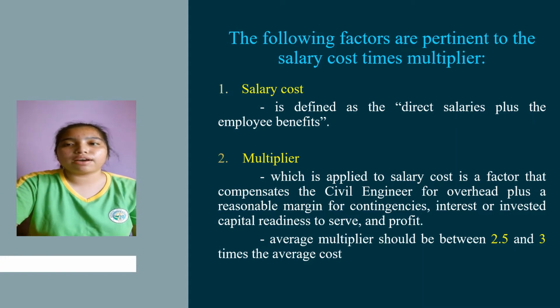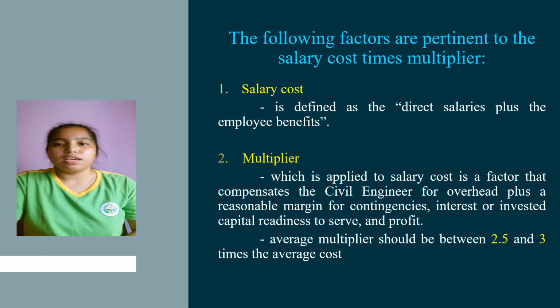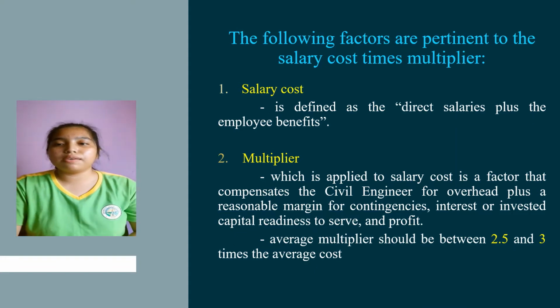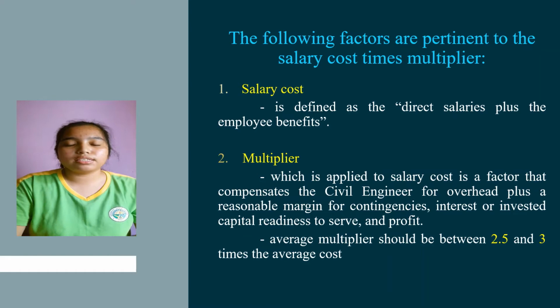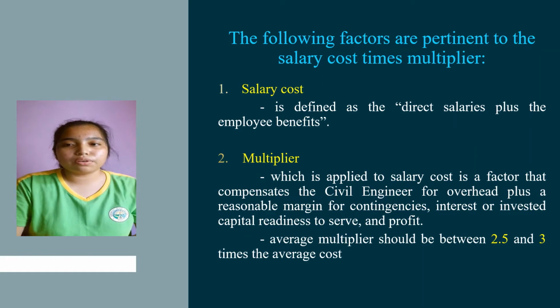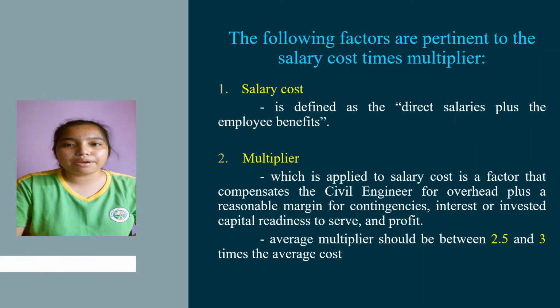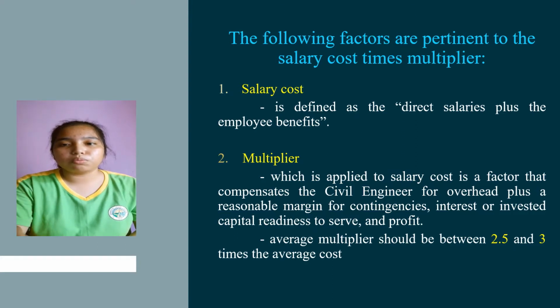Salary cost is defined as the direct salaries plus the employee benefits, chargeable to the project: sick leave, vacation, holidays, incentive pays, unemployment, and other payroll taxes, and the contribution for social security, workers' compensation, insurance, retirement, medical, and other group of benefits. So, pangalawa is the multiplier.